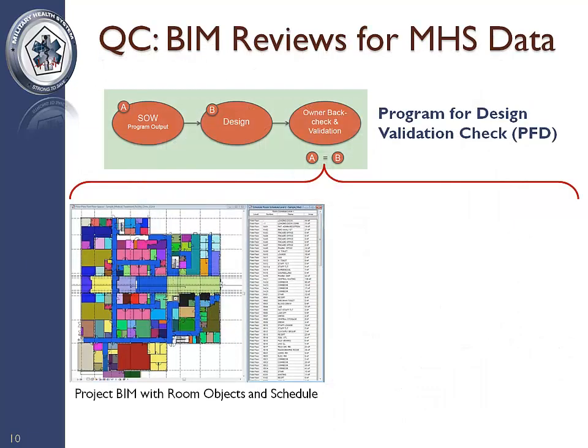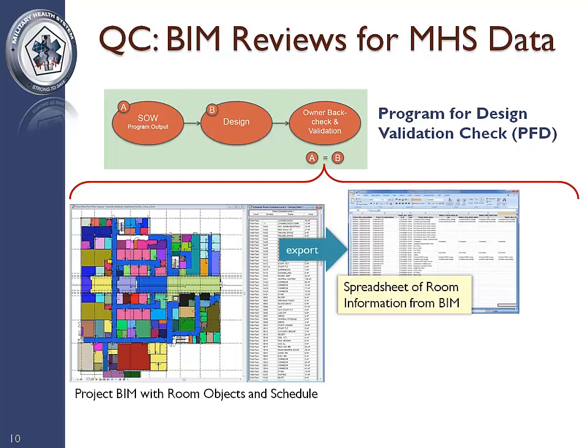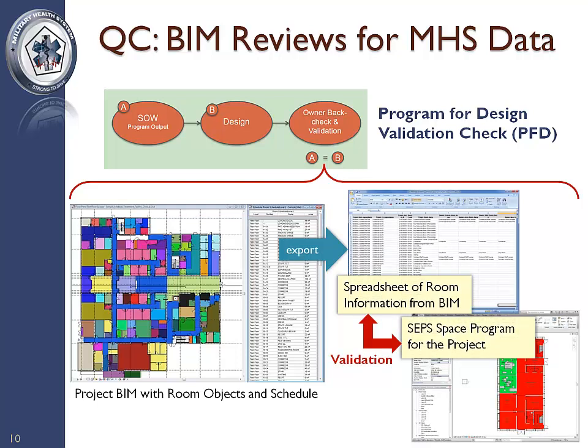One useful way to leverage BIM technology is to more quickly and accurately validate the program for design, or PFD. The BIM model can export information about the type and size of rooms in the model that can be compared to the PFD to validate that requirements are satisfied. The government will verify this by reviewing the exported report, typically via a spreadsheet.